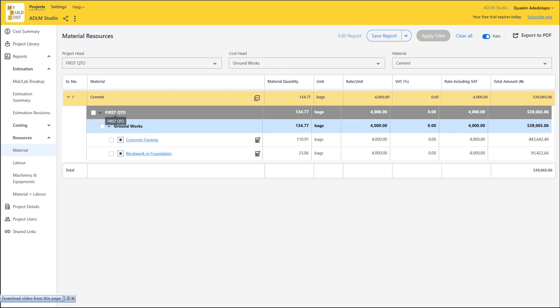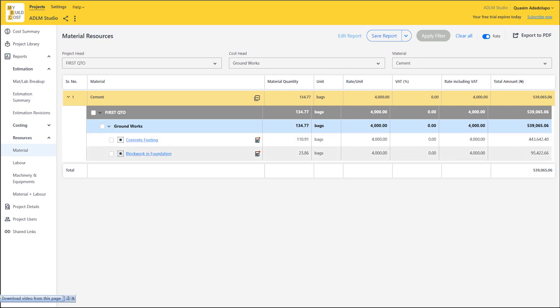For this groundwork, the cement we'll be making use of totals 134.7 bags. Now it's not just telling you the total amount of cement — you can even go further to see at which point you'll be making use of each portion. For these groundworks: for concrete footing, we are using 110.9 bags of cement, while for block work in foundation, we are using 23.86 bags of cement. The current price is shown here, so you can easily prepare your purchase order or work order quickly and faster.